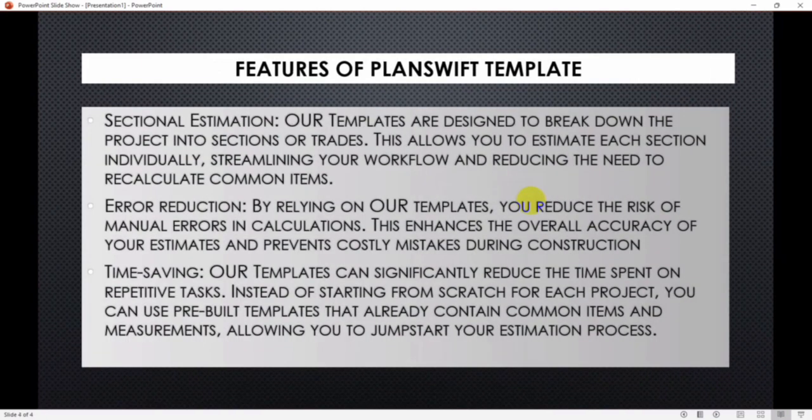Also we have sectional estimation. Our templates are designed to break down the project into sections or trades. This allows you to estimate each section individually, streamlining your workflow and reducing the need to recalculate common items.